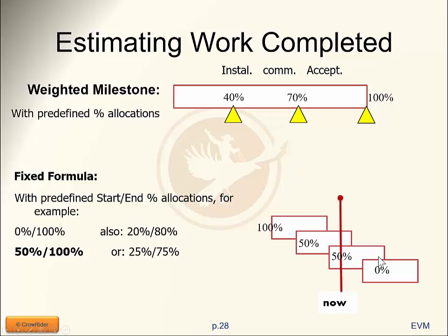And the idea is that you will have some work packages which are close to the end, others that have just started. If you have enough work packages and they are more or less similar in size, the error should wash itself off, right? That's the logic between these.